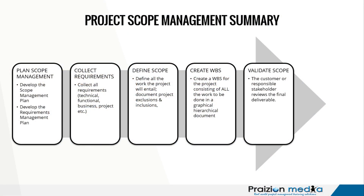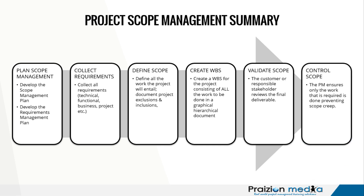After Validate Scope, the next process is Control Scope. In Control Scope, the PM ensures only the work that is required is done. Someone might ask: isn't that the same as Validate Scope? No. Validate Scope is an inspection. Control Scope is a check — like the Plan-Do-Check-Act cycle. You're checking to ensure that the work, not the deliverable, but the work being done is indeed the work that should be done. And if anyone has deviated from that, you should investigate and correct as needed.